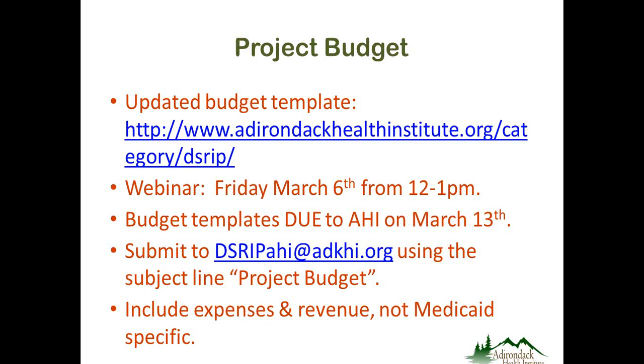So we understand that these projects, while they're designed to meet the needs of Medicaid patients, are certainly not restricted to the Medicaid population. And you can budget for your staff time in full. It doesn't have to be proportional to the number of Medicaid patients that are served by that particular provider or by that particular project.